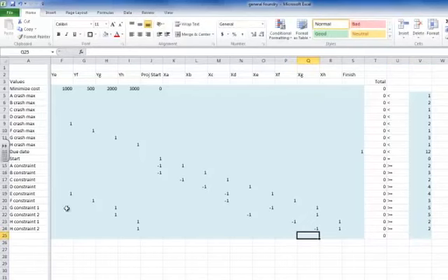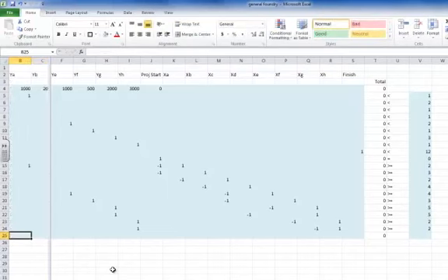And then my last constraint has to do with my finish constraint. So I'm going to type in finish constraint. The predecessor for the finish is task H, so I need a minus 1 here, positive 1 for my finish.